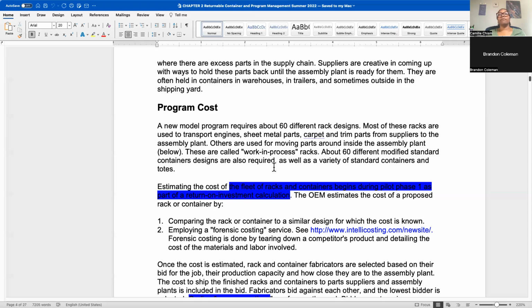I worked for a vehicle company, and I may have mentioned this before, but the company had not really tracked their returnable packaging. When I came in there and calculated based on a fleet calculation, which we'll be going through, I calculated that they were going to spend $600,000 on certain packaging. And they said, well, that seems like too much. So they set aside, I think, 300,000 for packaging, 325, whatever. They basically had said half. Everyone calls half of that. And that's what they thought they were spending.